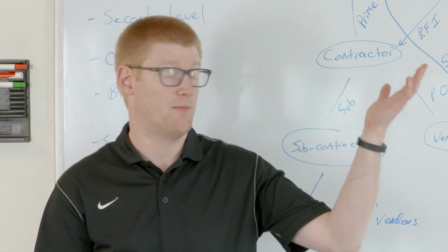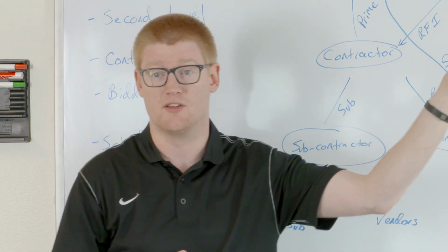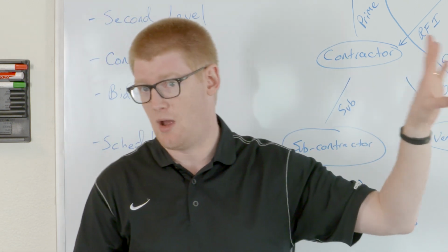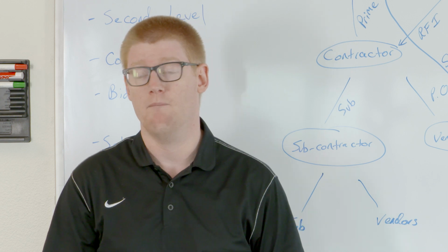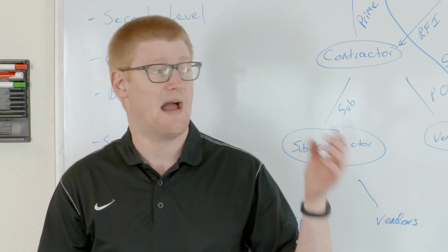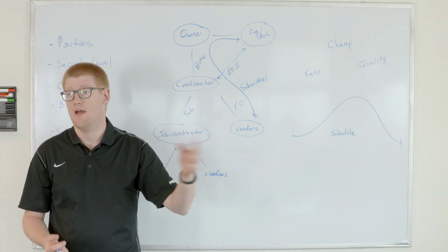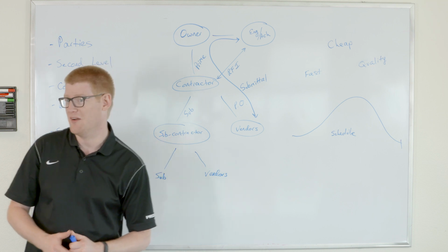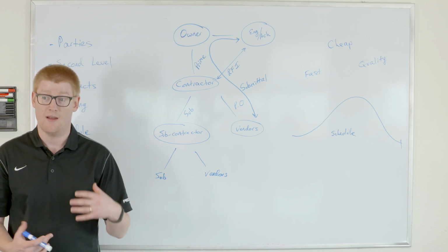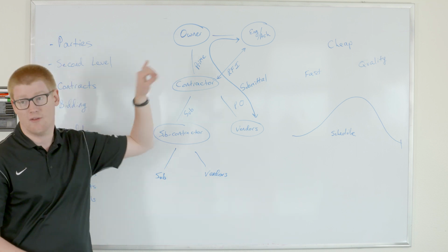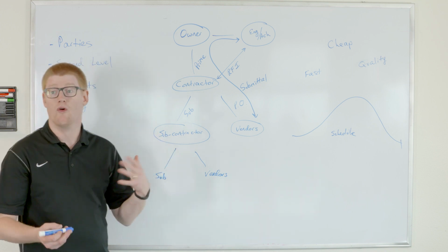So anytime we talked about that steel beam and how that beam was a little short and we shot back a question to an engineer, can we just weld on a piece and go? And they say, nope, I can't. I have to send it back to the steel fabricator to have a longer beam put on. Well, during the 2 weeks while I'm waiting for that beam to come back, my guys are standing around with no work to do. It's holding up people. I have to pay for that. I may have to pay to have a chiller held a little longer and not delivered when I wanted it to be because that steel beam was short. There's costs associated with that, and those often ultimately end up back with the owner, and they end up paying for a lot of that, unfortunately. And so we roll those into change orders.